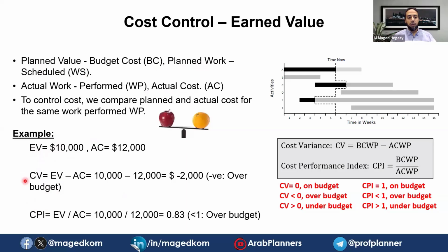If it is making profit and we are doing well, we can continue the same way. If we are not making profits, we can change. We can do root cause analysis and check what is the reason. Sometimes the reason may be something in the estimation, so next time we need to fix our estimation. Sometimes it is because of the construction.